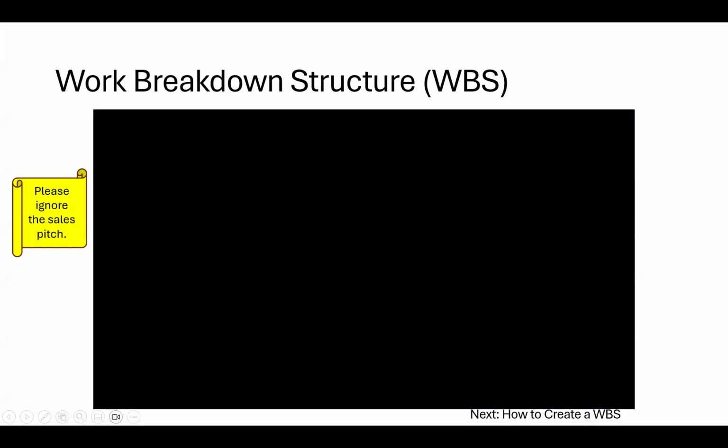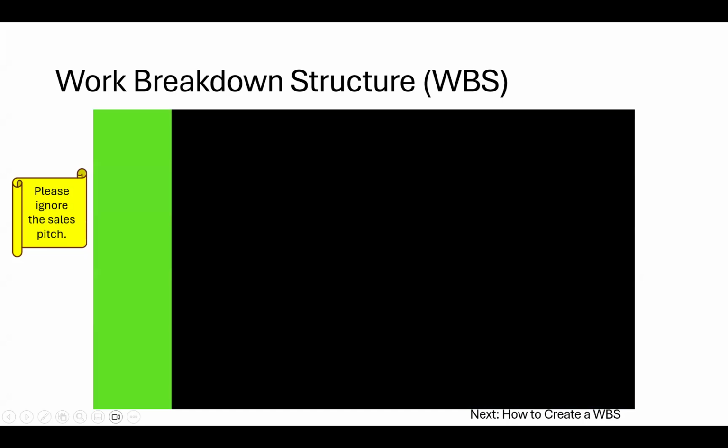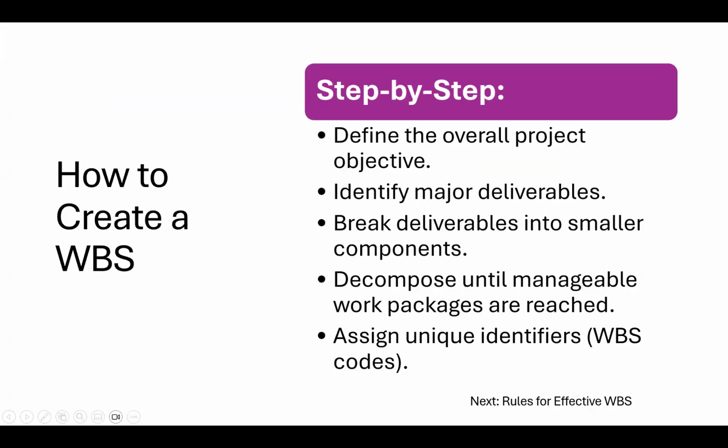Let's look at how to create a WBS. You define the overall project objective. Remember, we're using SMART goals and SMART objectives. Identify your major deliverables. Break your deliverables into smaller components. Decompose until manageable work packages are reached. And then assign unique identifiers.